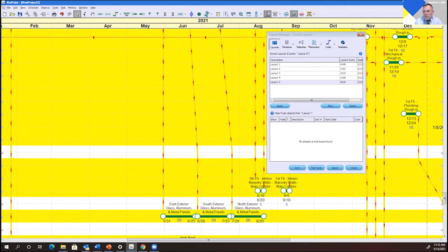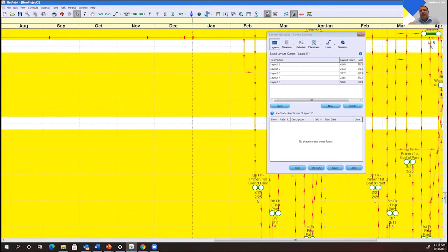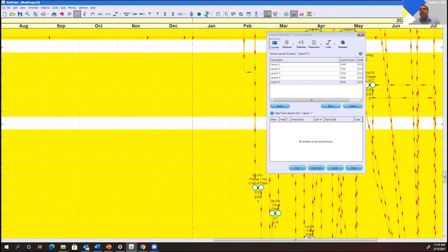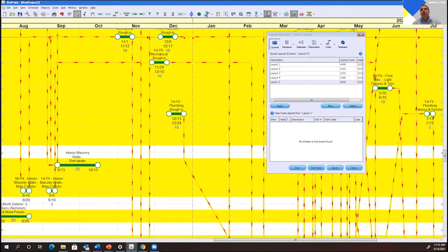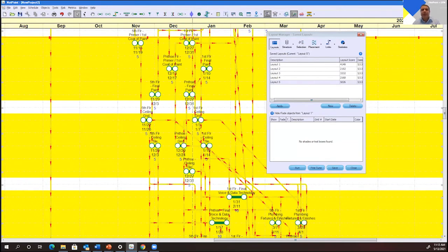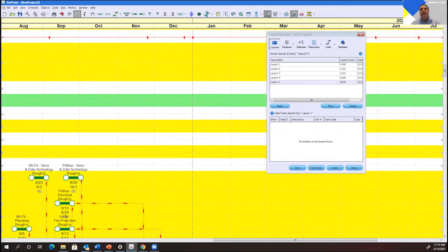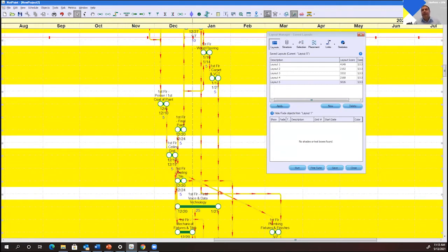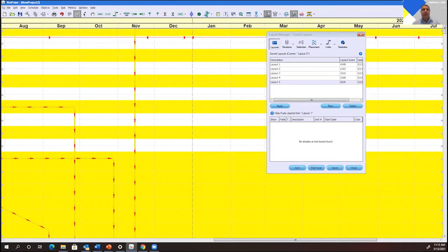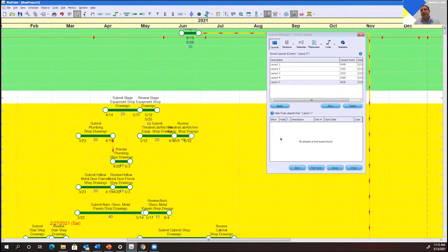And what role did float chain have to do in this process? So there are different ways that Autograph provides you. Float chain is one of them. The idea that you would want objects that belong to a float chain close together. So if that is what you're looking for, you would look at the float chain. Think of the most popular float chain, which will be the critical path itself, or the longest path. If people were laying out the entire schedule not into swim lanes, but just as a normal schedule in a single lane, then likely many people might want that critical path to be more continuous in a single grid, or as close to that grid as possible.